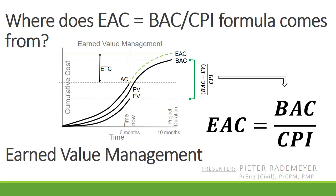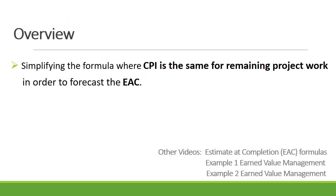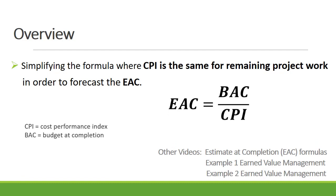In this video I'll be showing you where the formula estimate at completion equals budget at completion divided by CPI comes from, which is used during forecasting in earned value management. The formula most often provided in learning material is estimate at completion equals budget at completion divided by CPI.